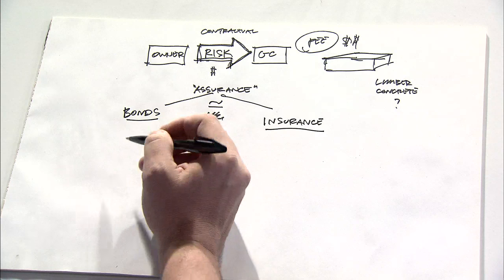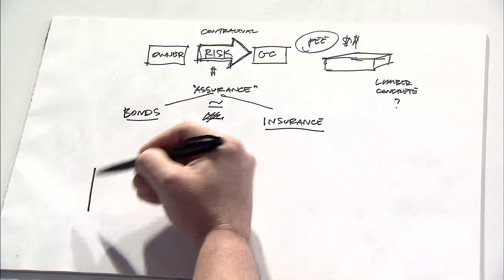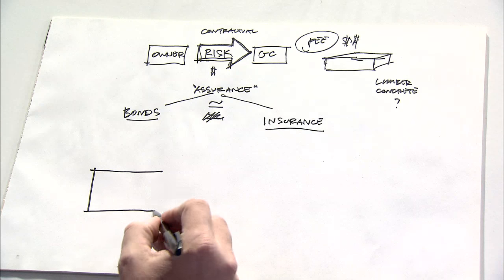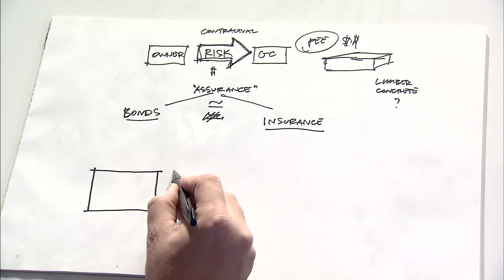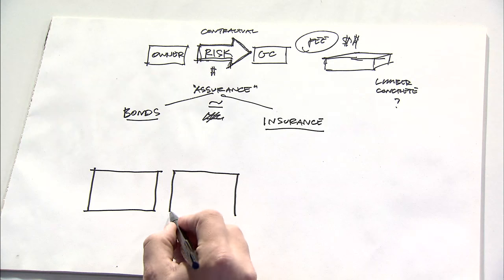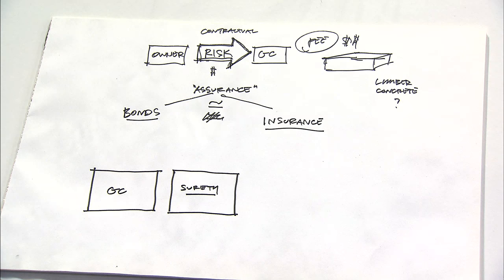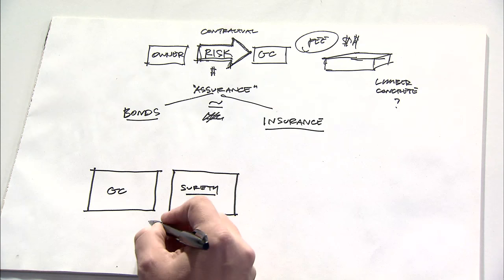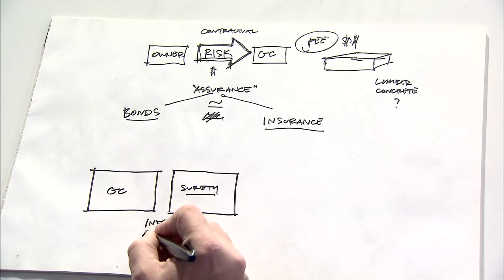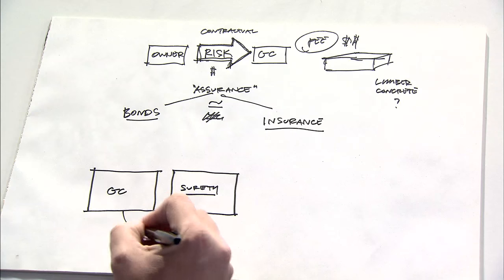Now, looking at some of the fundamental differences, first of all, let's talk about bonds. Bonds are functionally a three-party agreement. And the baseline proposition that happens is that there is some sort of relationship between a contractor and a surety. And by surety, I mean the entity that's going to consider providing a bond for the contractor.